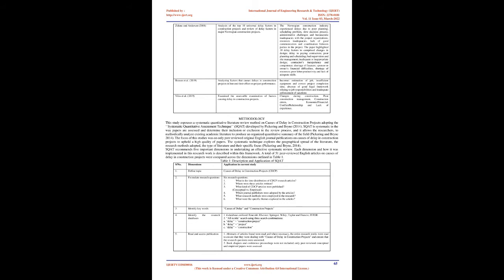Koshgofter et al., 2010, investigated causes of delays in Iranian construction projects. The findings identified that finance and payments of completed work, inadequate planning, improper site management, improper contract management, and communication gap between the parties involved are the main reasons that cause delay in the Iranian construction projects.